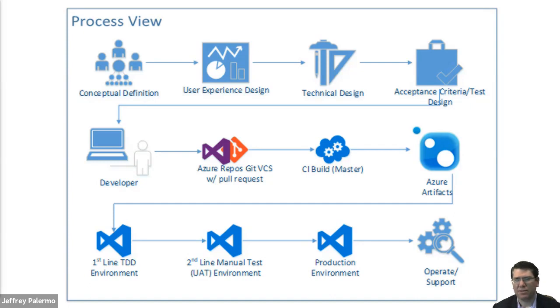And then the final design decision is the acceptance criteria or the test design. And that is the definition of done. This is the perfect place for Scrum's acceptance criteria. And this is literally a bullet point list of steps that you should be able to do on a manual basis to know that the software works well. Go to this page, click here, pull up this screen, check something else. Literally prescriptive, just a set of bullet points. Really, really simple.